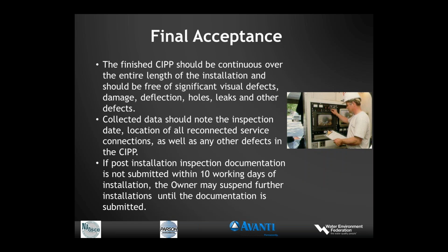Now, this post-installation inspection documentation should be submitted within a reasonable amount of time, for example, 10 working days. And if it's not, the owner may include provisions in the specifications to suspend further work until the documentation is submitted.